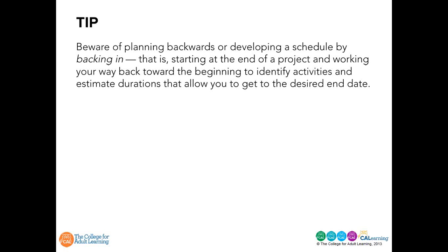Beware of planning backwards, developing a schedule by backing in. That's starting at the end of a project and working your way backwards towards the beginning date to identify tasks and activities and estimate durations that will allow you to get to the desired end date. It's a very, very common way of planning something, but it has its perils.